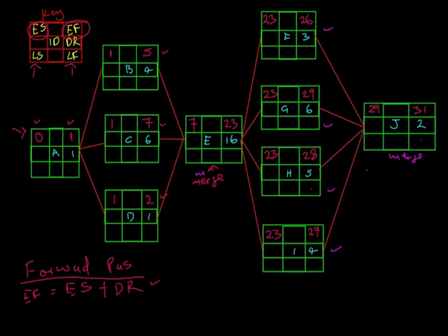All right, the rule that we were talking about that pertains to the last activity here: once you are done with the last activity like this, all you have to do is match 31. We see that we've got the early finish there of 31, right? So what you do is you also come down here, you say 31, and here the early start is equal to 29, so we've got something like that. You don't need to calculate these figures, you just need to match the top with the bottom. I am not really sure why, but it works.